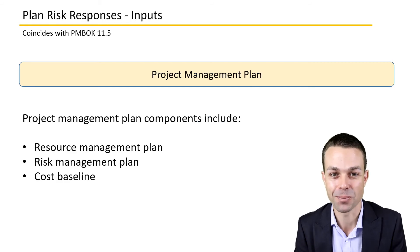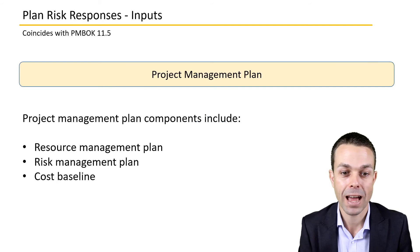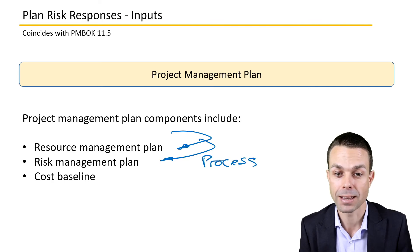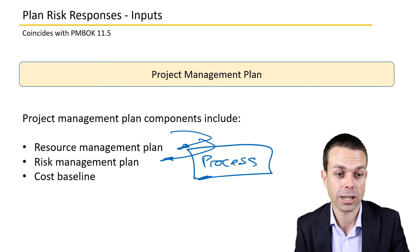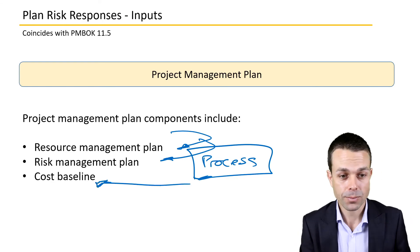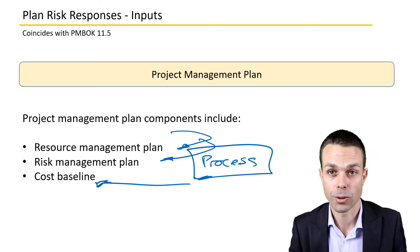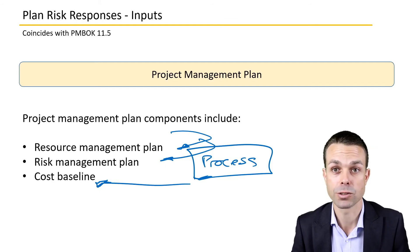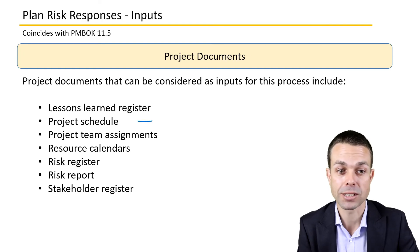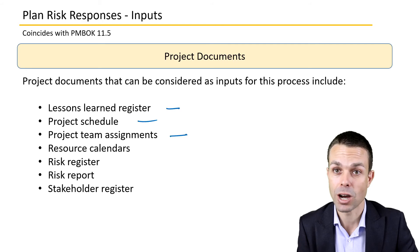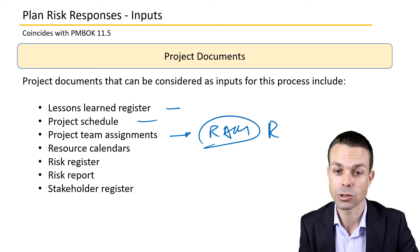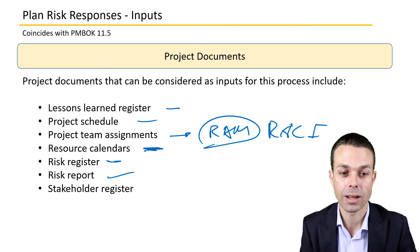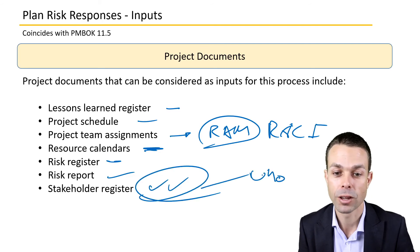Looking at the inputs in more detail: the project management plan includes the resource management plan, the risk management plan — the process we agreed upon for gathering and analysing risks — and the cost baseline. Project documents we might need include the project schedule, lessons learned, project team assignments such as the RACI, resource calendars showing who is available and when, the risk register, risk report, and stakeholder register.